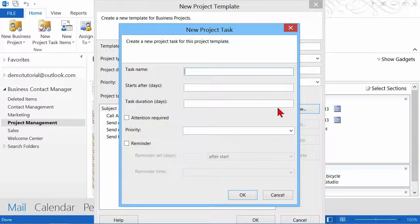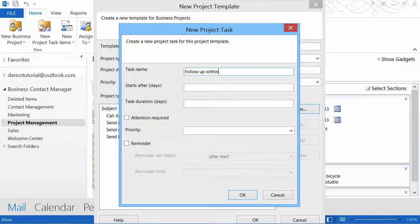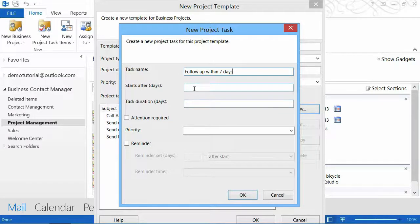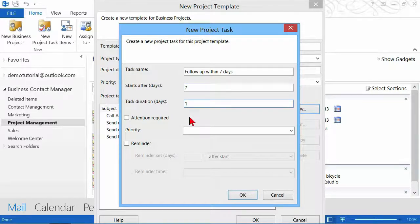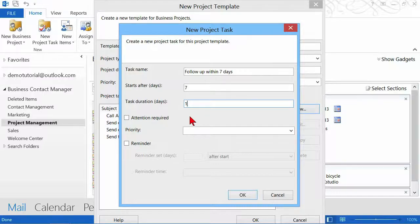I definitely want to follow up within seven days. So I want this to start on day seven and I get one day to accomplish. Now, all of my tasks are things that I need to accomplish on a specific day.